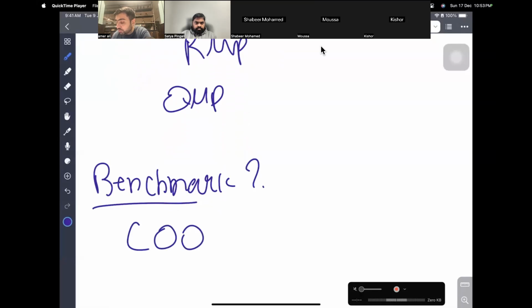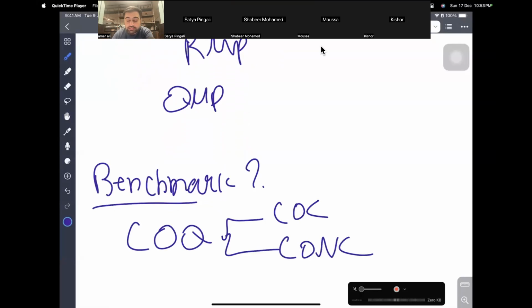And what is the cost of quality, the cost of conformance and the cost of non-conformance? Money spent to avoid failures, and money spent because of the failures. I need to calculate that cost. That cost is extremely important, and it can be helpful or damaging to the project. We need to add that cost.